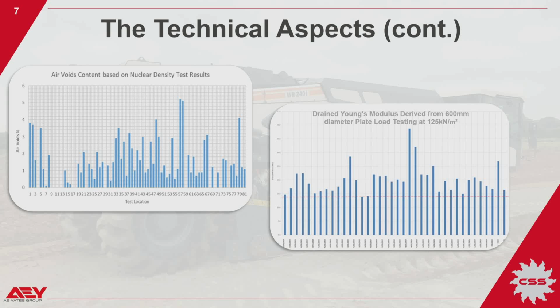The lime modification works were carried out in 300mm layers, and up to 10 layers were required in the deepest fill areas. The mixers themselves precisely controlled depth, dosing of water and binders to ensure mix compliance and accuracy, and accurately control mixing depth to deliver maximum efficiency and predictability. 20-ton rollers were also used to ensure the 100% compaction could be achieved in plant-intensive operations. The project was carried out in 7 weeks, achieving the required programme.